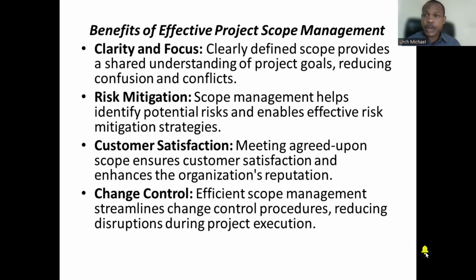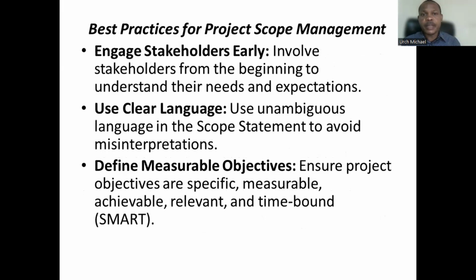So if you're going on and then you want to make a change in the project, already you have a baseline, meaning an agreed scope. So what you need to do is to effect the change and know what you're adding to the scope of the project. That means you're coming up with a new version of the initially agreed scope and project in the project management plan. All right, so it gives you a basis for measuring changes in the project. Yeah, so these are the benefits.